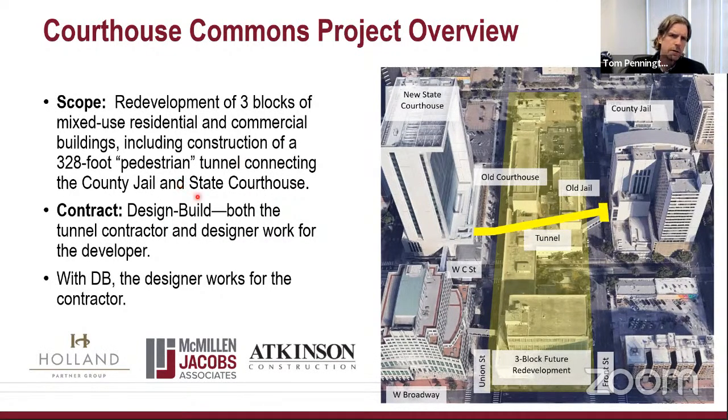The contract arrangement was a design-build contract with the developer, Holland Partner Group, who we worked for as the designer, McMillen Jacobs. It's not strictly a design-build relationship because we were working for a developer, but it was like a design-build project because we were submitting our documents to the developer and the contractor at the same time. And the developer also held the construction contract with the contractor.